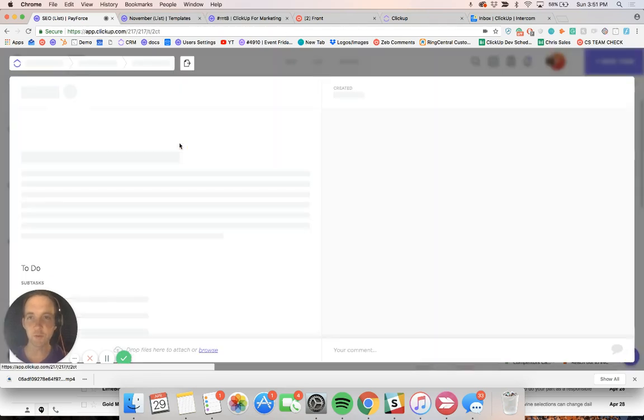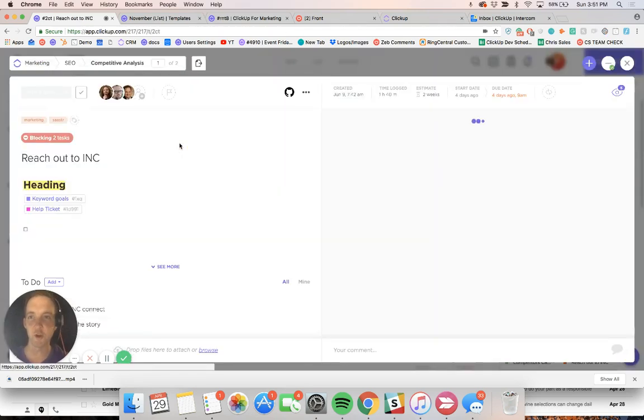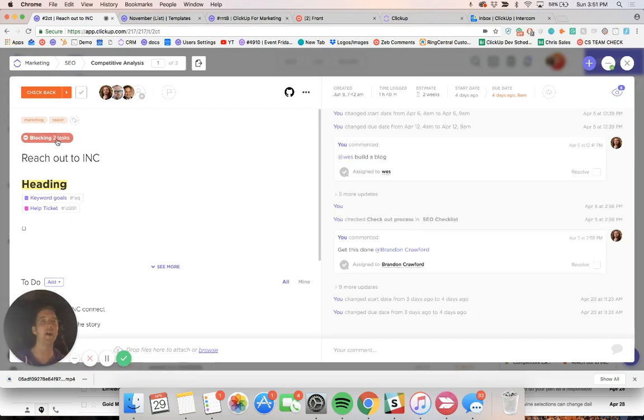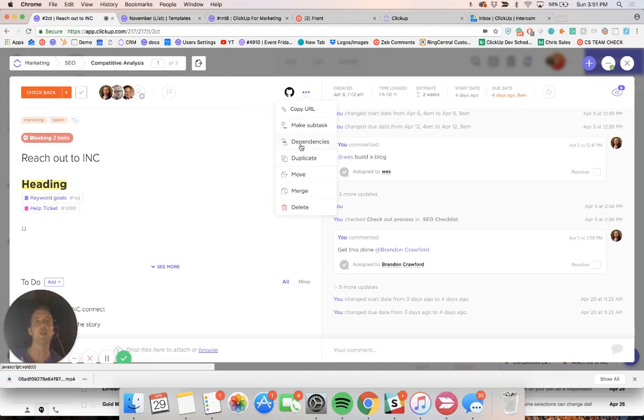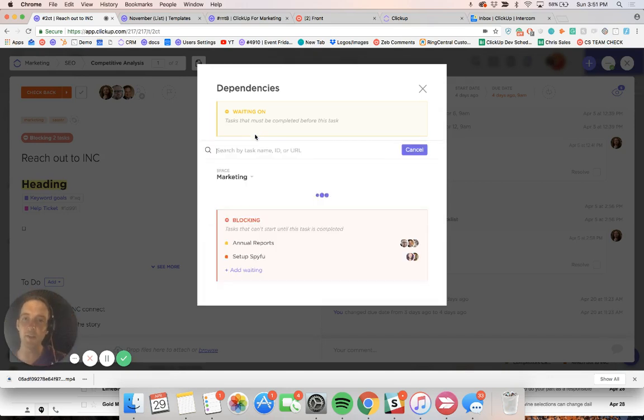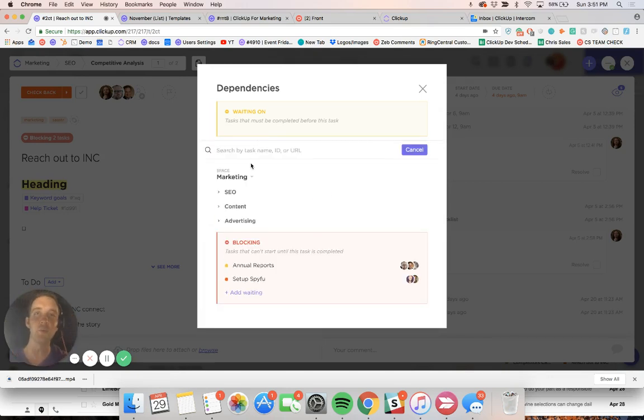A few other things I want to make sure you're aware of that are perfect for marketing teams. One, we all know that sometimes someone starts on a task that is not ready to be started on yet, or maybe we need to finish the blog before we work on the image, and that makes perfect sense. You don't want people duplicating efforts or working on something they don't need to, which is why we created task dependencies. These are perfect for you. Right here, you can say, okay, this task cannot be started until we finish these tasks here. And you can do this for subtasks as well.